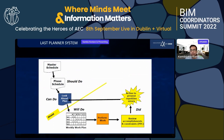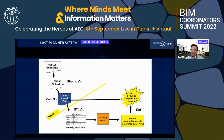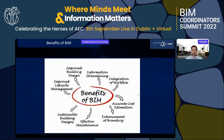In developing countries we have many challenges, and we brought these techniques to cope with them. Work that should be done is planned in weekly meetings with emphasis on the master schedule. Constraint analysis is an integral part of the Last Planner System, allowing a proactive approach to problem solving. One of the most important achievements from the Last Planner System is taking action to prevent repetitive errors.